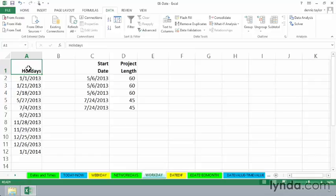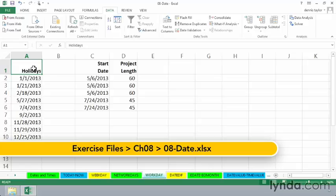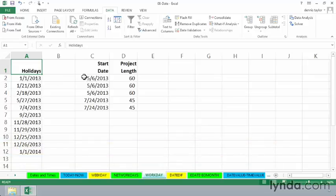When you're trying to calculate a final date, perhaps working with projects, you need to use a function called WORKDAY if you want to be able to account for weekends and possibly holidays.